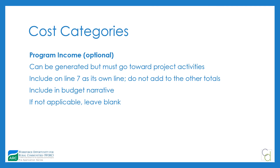One last item applies to only a few of you: program income, listed at the very bottom of Section B of the SF-424A. You are allowed to generate program income from a WORK grant, but the income must go toward project activities. Include this in line seven, but do not add program income to any other totals, including your overall total reported on the SF-424. Do include it in the budget narrative; if it's not applicable, you can leave it blank.